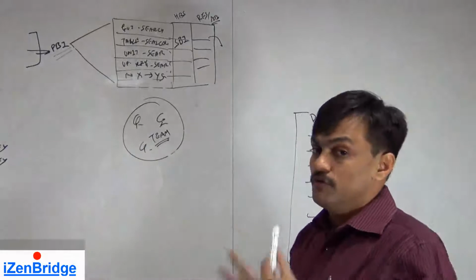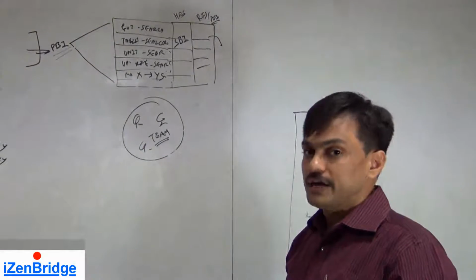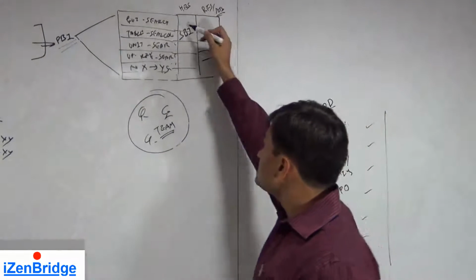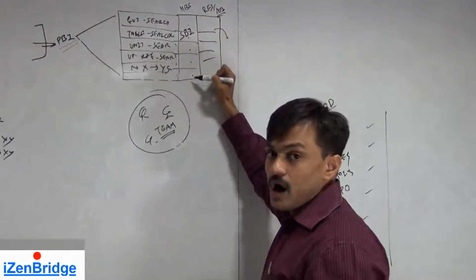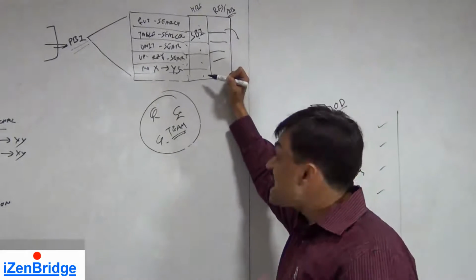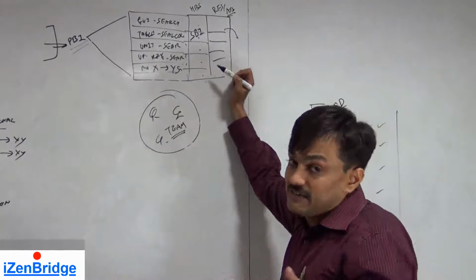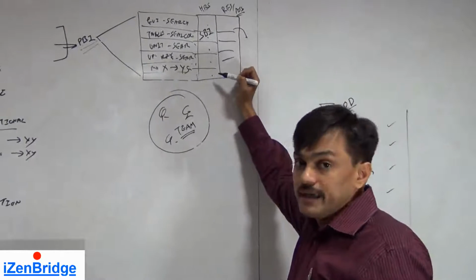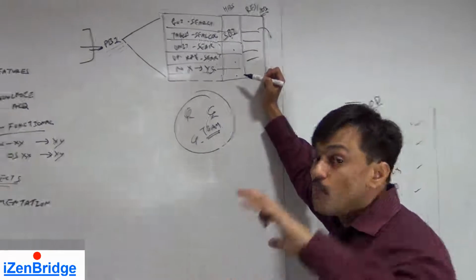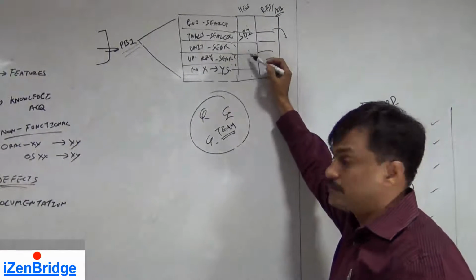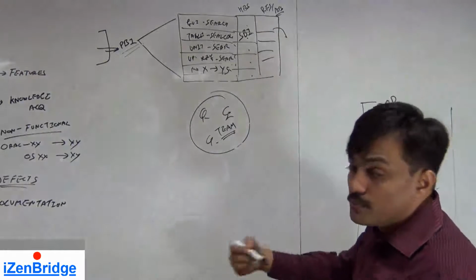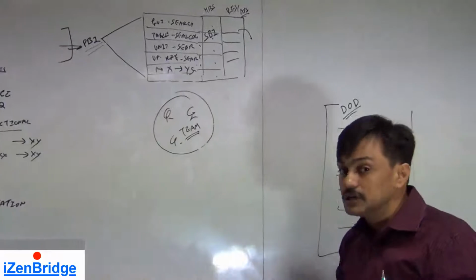It is not like we baseline it at the beginning of the iteration. The second thing we should remember is that the hours which we estimated here are also not frozen. As we get more visibility about a given task, we can modify the estimated hours left or more needed for a given sprint backlog item. So we can keep changing this estimate as we move inside the sprint, as we learn more and more.